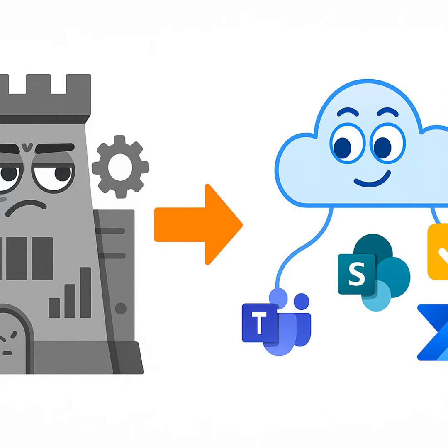Ready? Good. Step 1. First, we start with a SharePoint list. The humble, misunderstood list, Microsoft's oldest multi-tool. Create a new site or use an existing one, then click New List. Name it Project Tracker. Add columns: project name, owner, due date, and status. That's the skeleton. You can add extras later, like priority or budget.